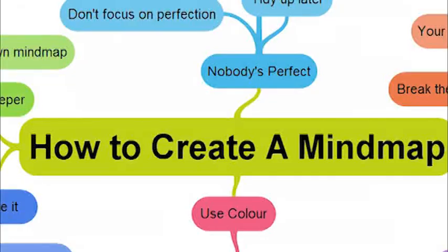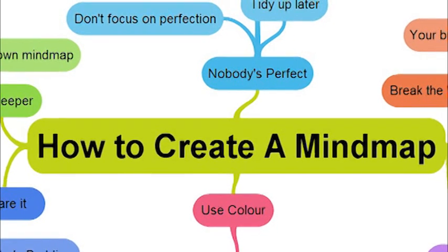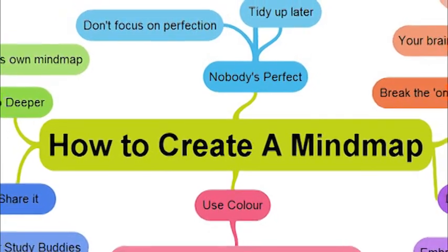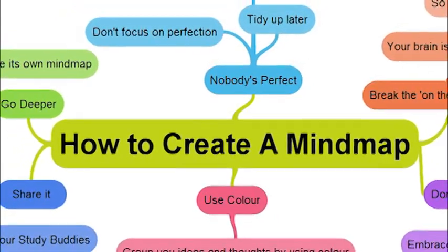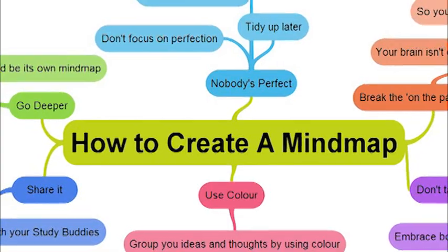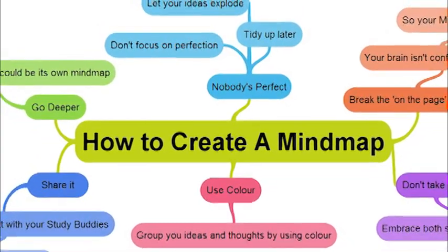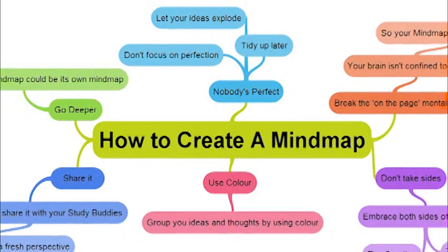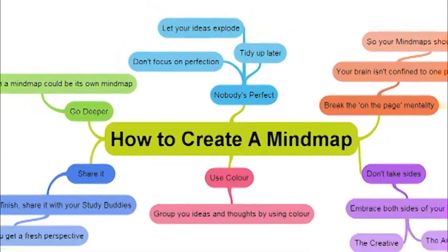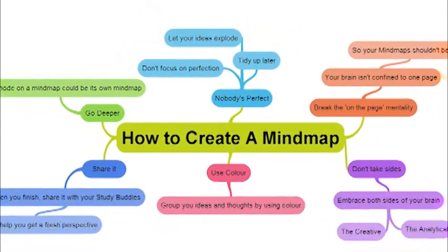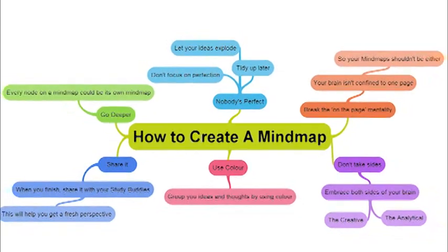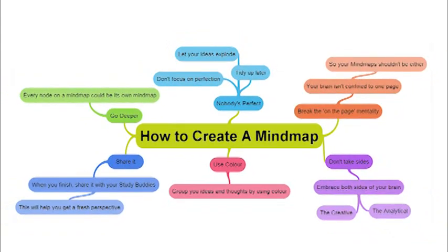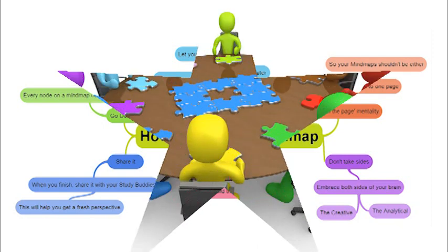After the brainstorming, we evaluate the ideas and the resources the clients have for execution. We put these ideas on a mind map — mind mapping is a great way to summarize concepts and ideas onto one page. Due to time constraints, sometimes we present the clients the mind map in its own format. From here, they can select and narrow down the activities for the campaign, which then becomes the scope of work, and we provide the client a quotation for the service.